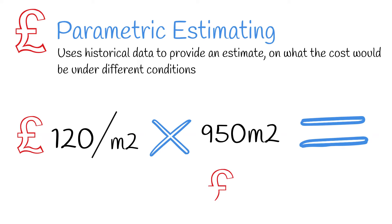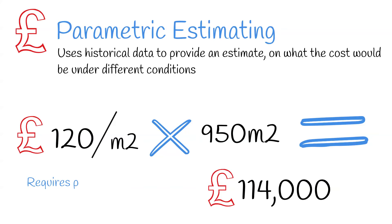For example, square footage. This method is flexible to the level of information available, and is often considered a more accurate approach than analogous estimating. However, it requires data from projects or activities that are similar and scalable.